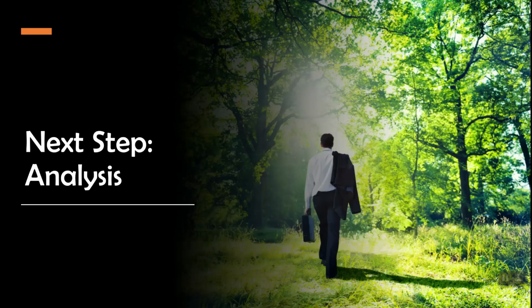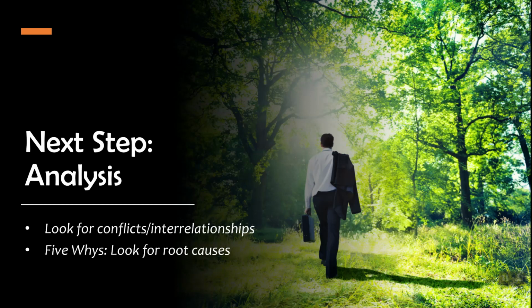Brainstorming is only the first step. You use the results from the brainstorming to seek for potential causes. Once you've identified those potential causes, you validate your guesses by gathering data to support or disprove your hypothesis.